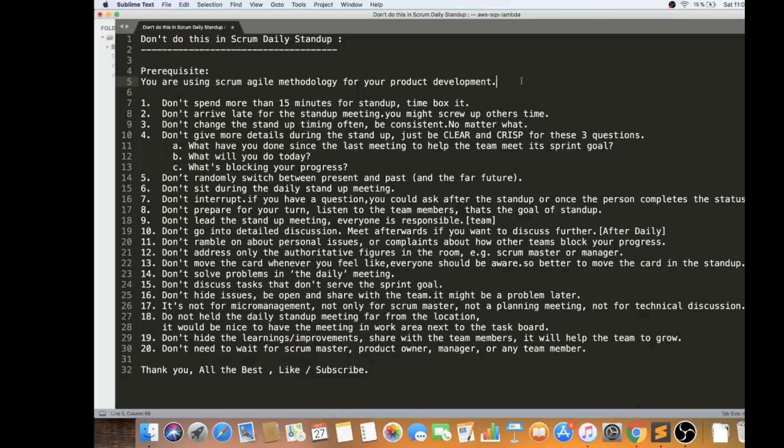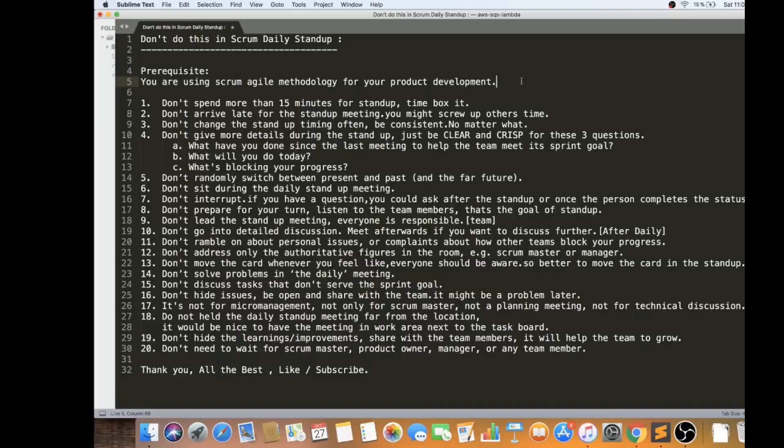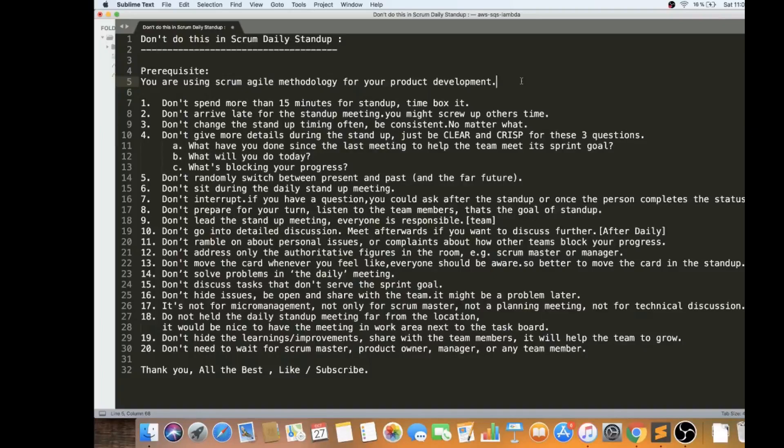It's very important because in your mindset it will be set that you have a meeting at 10:30, you need to update, you need to provide your status. Then the next point is don't give more details during the standup. Just be clear and crisp and be ready for these three questions: What you have done yesterday to help this sprint goal? What will you be doing today? And is there anything blocking your progress? Do you need any help from the team members or outside the team?